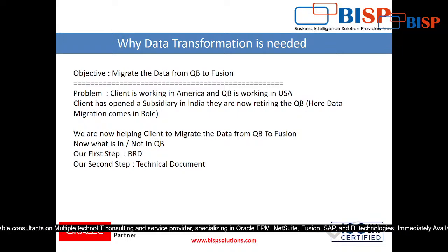Now first of all, whenever the question comes that yeah, you have to migrate the data, first of all we need to see what they are working, how they are working, exactly what process they are following, and after examining that process, then we will prepare a BRD, that exactly what the data that we need to migrate, right? So we need to first of all identify exactly what data is to be migrated.